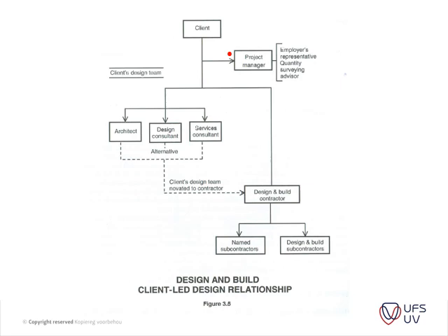So the main thing about this process is the contractor advises the client on who he wants on the project, and then the client appoints them. But the main difference on this type of projects is the contractor is already involved during the design stage. So it's a very nice way of doing this. Other ways of referring to this is maybe partnering or collaborative tender methods.